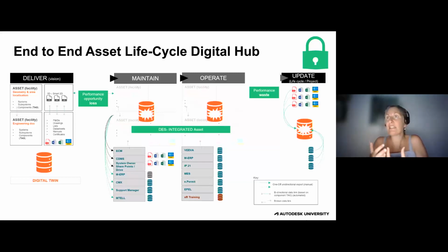The owners of those systems need data, and they are going to extract data from the common data environment as a one-off, because there is no other usage set up. So they extract the data they want, and then they have their operational system going. By doing so, it's like you break it to use it, and they make the asset obsolete just after delivery.